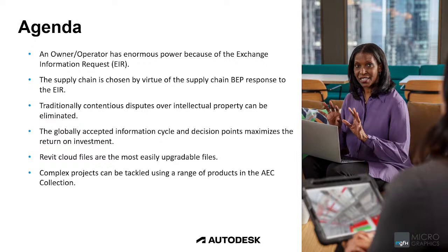We are 100% prepared to meet your requirements. We will use the software that you state. We will use the common data environment that you are saying, and it will be managed in that way because this is your requirement. Right? And very simply, if the supply chain is not prepared to meet those requirements, the owner or the appointing party does not have to accept their tender, and the project can go to somebody who is willing to operate according to the exchange information request by the client.